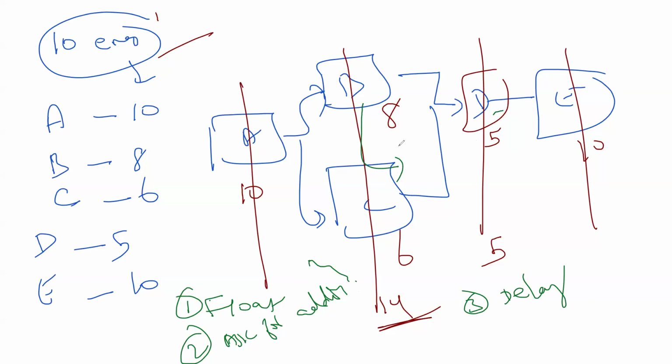So this is the realistic schedule. You have made a doable schedule by optimizing resources. If you are using the first 2 techniques, you are in resource smoothing. If it is the third one, it is resource leveling.